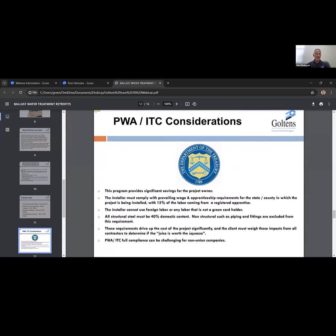All right, PWA ITC considerations. So this program, as most people in this webinar will know, provides significant savings for the project owner. For example, some of the compliance requirements are the installer must comply with prevailing wage and apprenticeship requirements for the state and county in which the project is being installed, with 15% of the labor coming from a registered apprenticeship program. The installer cannot use foreign labor or any labor that is not a green card holder. All structural steel must be 40% domestic content. Non-structural, such as piping and fittings, are excluded from this requirement.